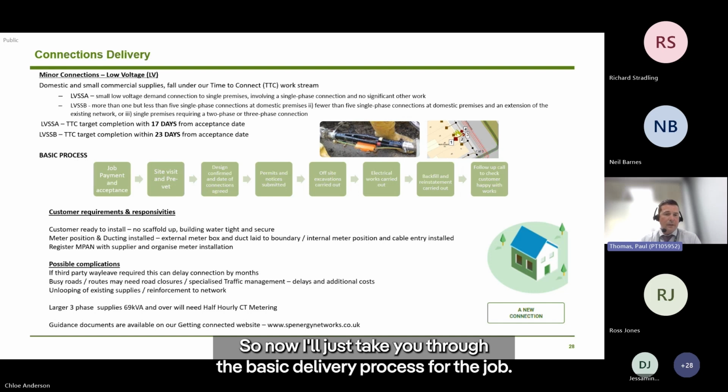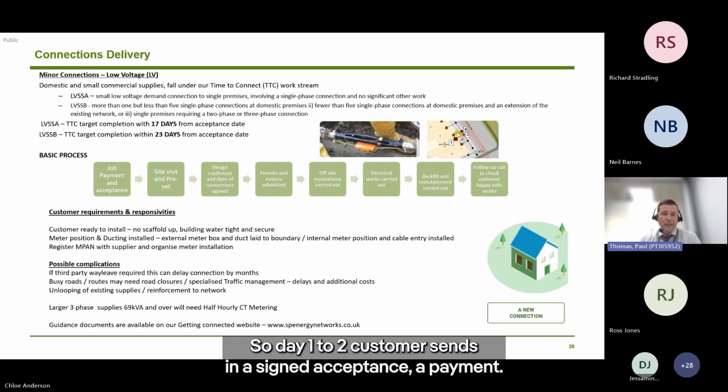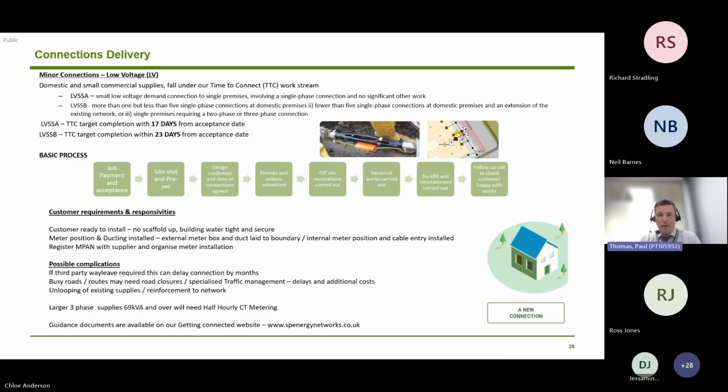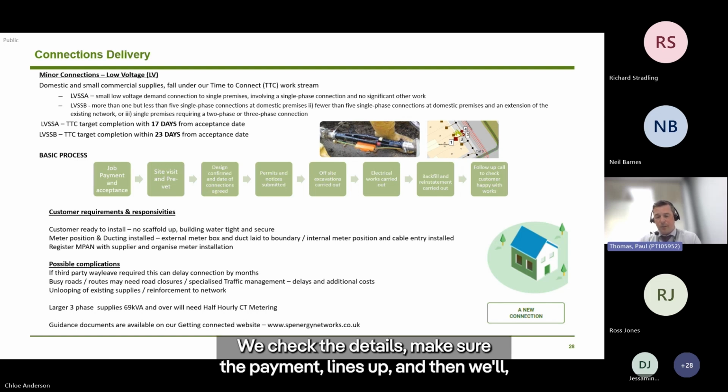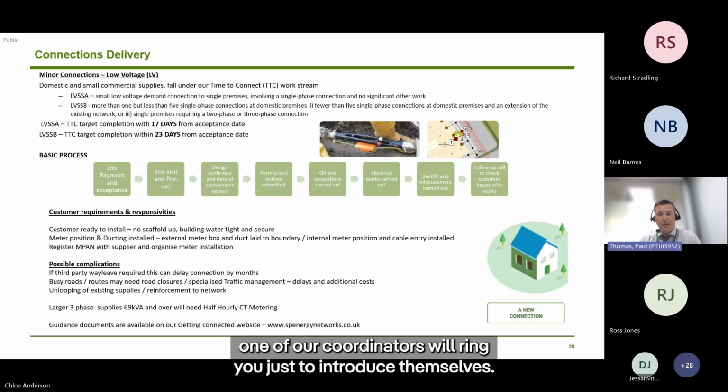So now I'll just take you through the basic delivery process for the job. Day 1 to 2, the customer sends in a signed acceptance and payment. We check the details, make sure the payment lines up, and then one of our coordinators will ring you just to introduce themselves, say they'll book a pre-vet, and go through any details with you.